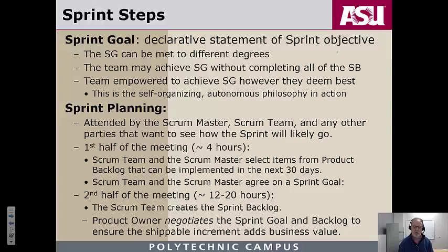And the answer is either yes or no. Or the answer could be high, medium, or low, which is what different degrees means. But different degrees means discrete degrees. Part of the reason that's important is that too often those new to sprint and used to working in that task-driven model have a tendency to say, well, I'm 70% done because I did 70% of the estimated work or 70% of the estimated tasks.